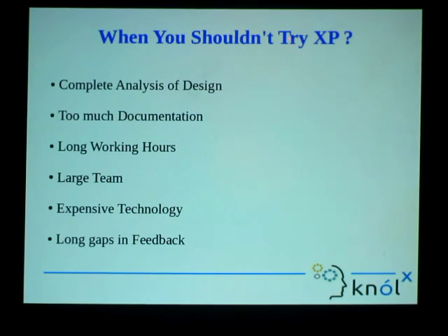When you shouldn't try XP. Till now we have seen advantages and the process to adopt it and other things for XP. Now we need to know where we shouldn't try XP at all. The first case is complete analysis of design. If the client asks for a complete analysis of design before even the development begins, it means we cannot adopt XP at all because the design actually changes